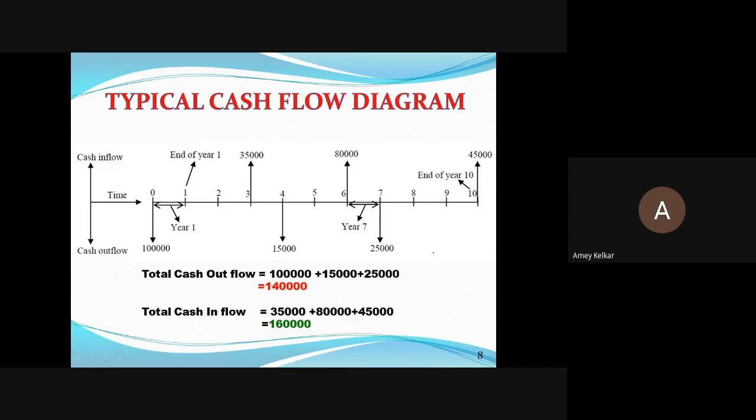But if you are in a condition where you have to manage the funds, then you have to delay some activities or speed up some activities, such that at the same point of time when you are handling a portfolio, the activities which will cause a heavy cash outflow will not occur at a time. Okay, so that is important.